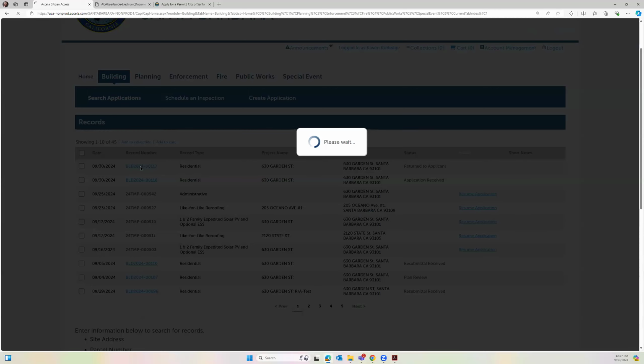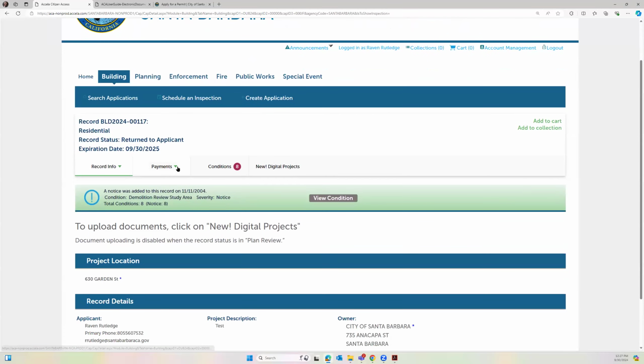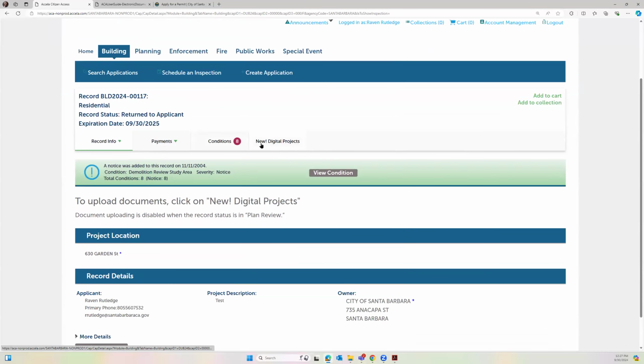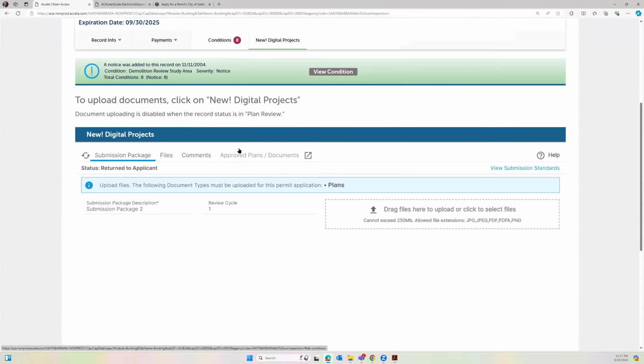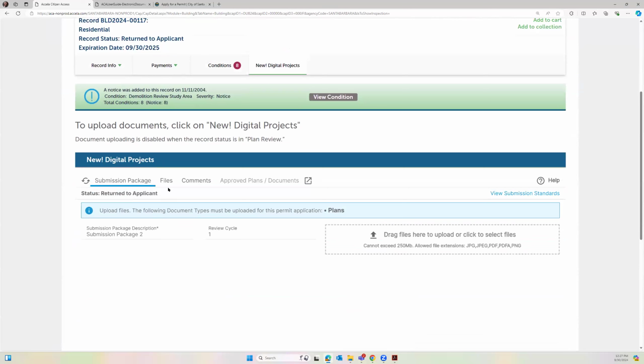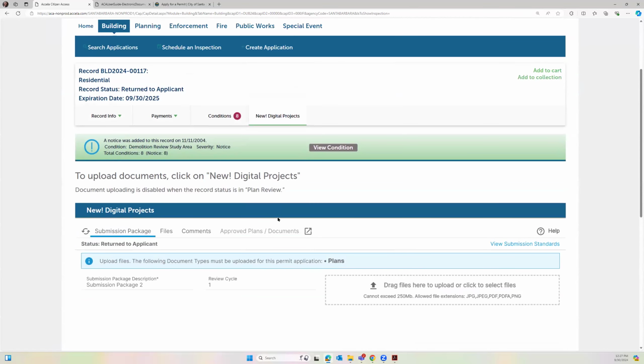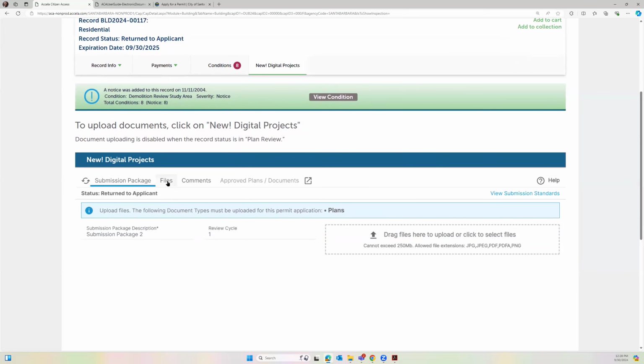So you would click that BLD record number to bring up that page. Again, here's that new digital projects. I'd click that, and you can see the difference here. Remember the last one I did, it was in plan review status. This did not open. I couldn't even get here. So you can see I can upload, and it's expecting me to upload plans because I had corrections on my plans. That's the other really cool thing about this document: staff are now going to be able to put corrections on multiple documents. So if there's structural calcs that need a correction, they can put structural calcs. And then on here, it would say it's expecting you to upload structural calcs because you got corrections on your structural calcs.